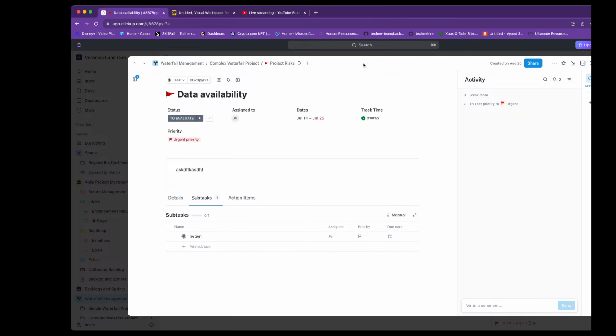So I have, in project management terms, I've just outlined by having this conversation with Bonnie, my time optimistic, time pessimistic, my time most likely. But that's still just a guess. I'm still just guessing. I don't want to guess anymore. I want to compare it to an actual. So what I can have them do is click start timer. When you start to work on data availability, we'll just say today, I want you to start timer. When you're finished working on it today, I want you to click on stop timer.